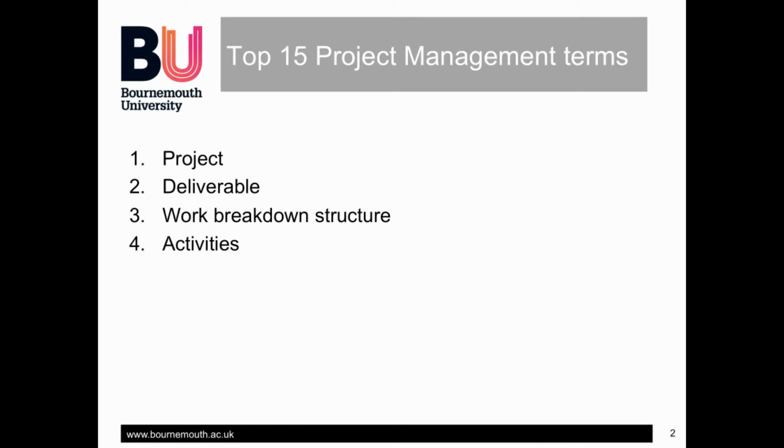These are discrete pieces of work that can be undertaken by one or a small number of people. Typically, tasks range in time to complete them from a few hours to no more than 2 weeks. All projects will contain from tens to many thousands of activities. An activity from the party project would be, for example, to buy 6 cases of non-alcoholic beer.